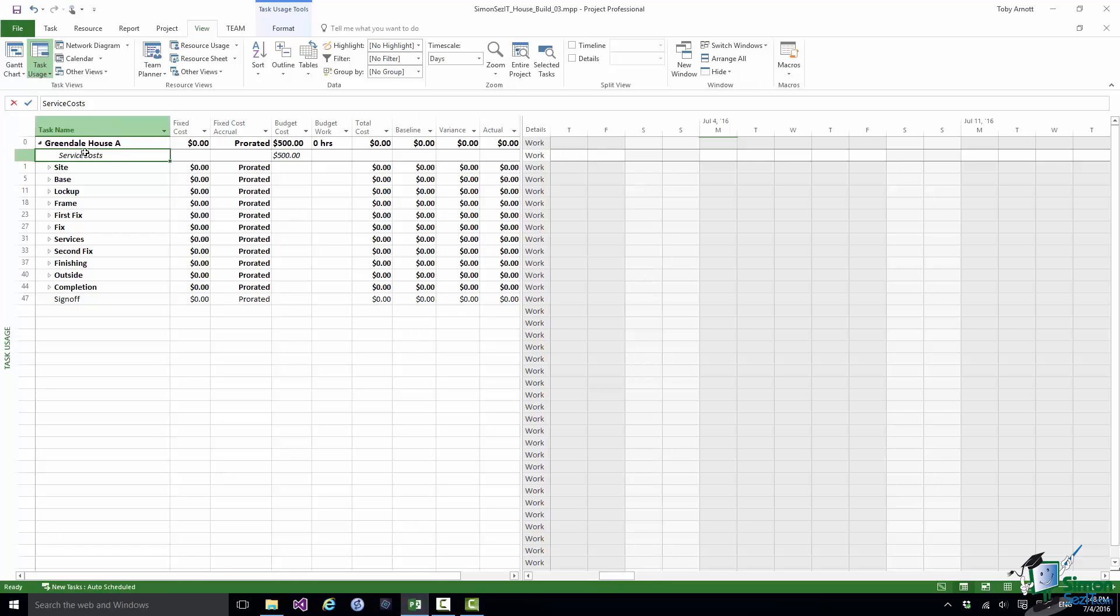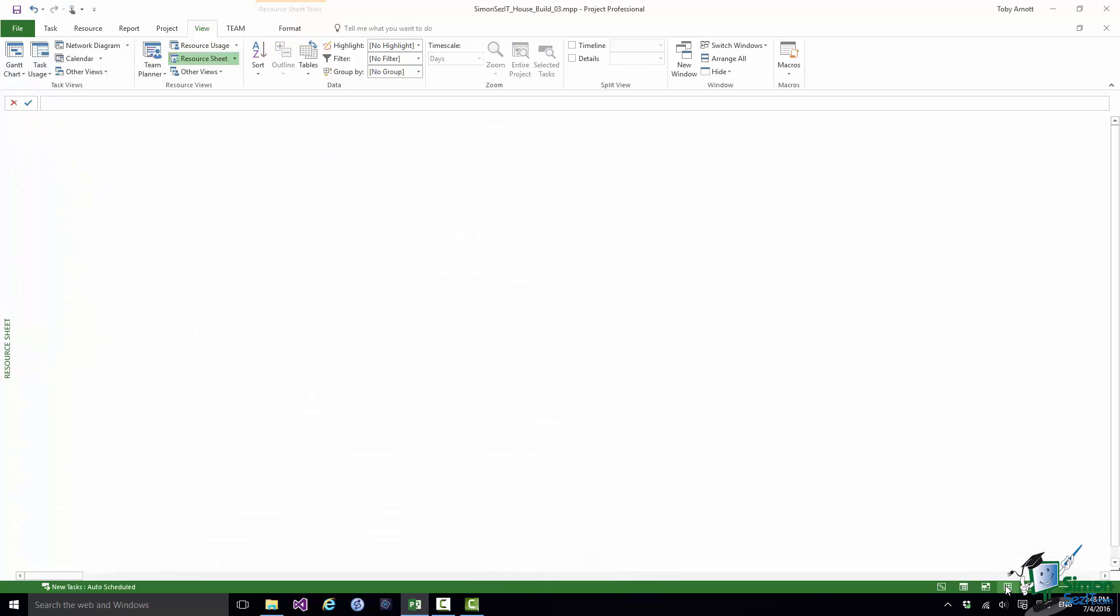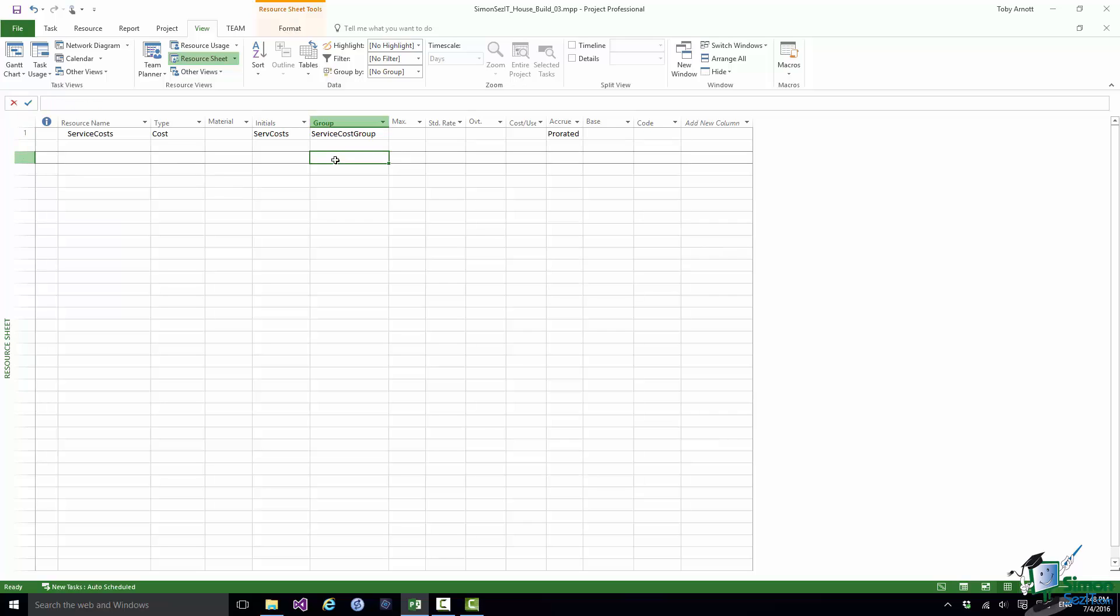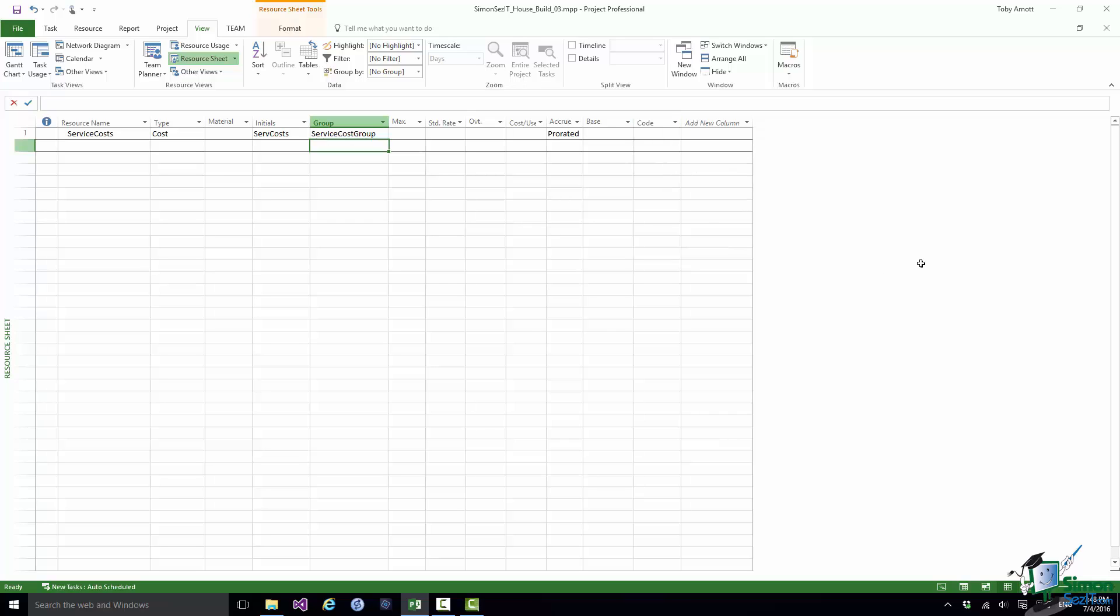What I'm now going to do is to create a couple of resources that are going to basically be in the same category as that budget cost. When I say in the same category I actually have a number of ways of doing that. What I've done on this occasion is to create a group and I will specify what you might loosely call this category by putting those other resources in the same group. I have alternative ways of doing this. I could use code or I could use a custom field. You've already seen how to use custom fields earlier in the course. You'll see why each of those methods is possible in just a little while.